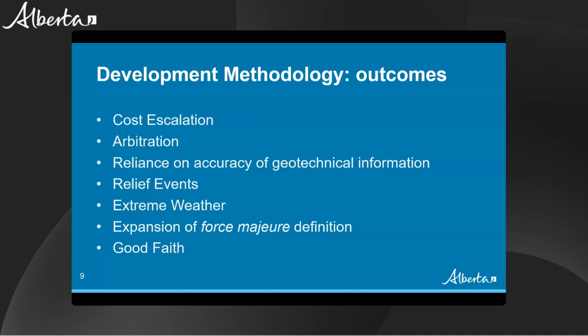At the same time, consulting contracts now contain express provisions about the province and contractors relying on the reporting. Please note, however, that we also heard feedback from the consulting industry expressing concern that they couldn't manage the risk of how that information was interpreted and used, which we also agree with. So contractors will remain responsible for how they interpret and make use of the consulting information they rely on.